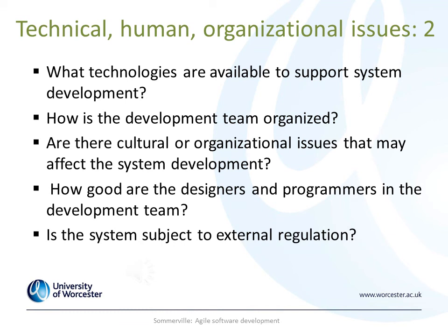Is the system subject to external regulation? That's another aspect that one has to consider. For instance, if the system has to be approved by external regulators, for software that's critical for aircraft, software that's critical for NASA, any aspect like that, then you are going to be expected to produce detailed documentation as part of the system to ensure safety.